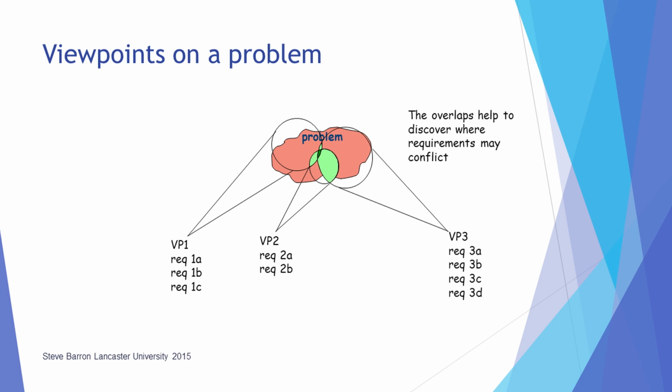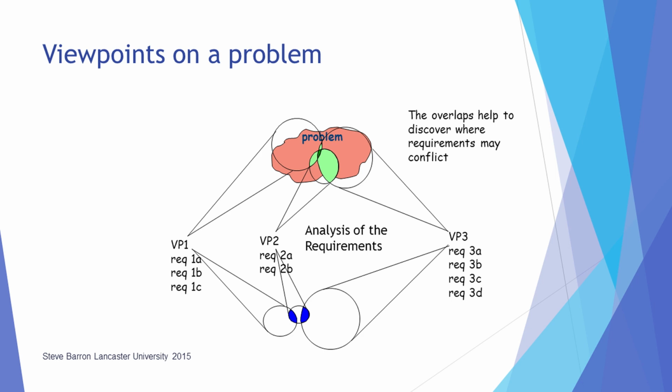Throughout, it is important to consider any overlaps in the viewpoints and to discuss with stakeholders how the problem can be identified to include all the perspectives if possible. Once all of the viewpoints have been identified and assessed, the range of perspectives can be defined and clearly written down as a definition of the problem, mapping the requirements into a combined statement of the problem. This will include resolution of any conflicting requirements that may be embedded in the overlaps.